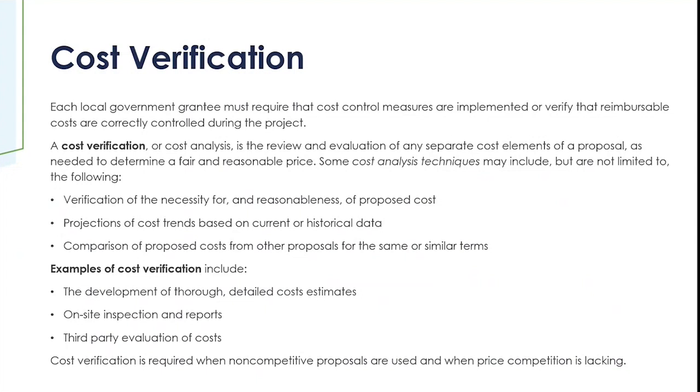Okay, so again, we've talked about cost verification. We haven't really given a true definition of it, but a cost verification, also known as cost analysis, involves the review and evaluation of the separate cost elements of a proposal as needed to determine a fair and reasonable price. Okay, there are a few different ways that you can go about conducting a cost analysis.